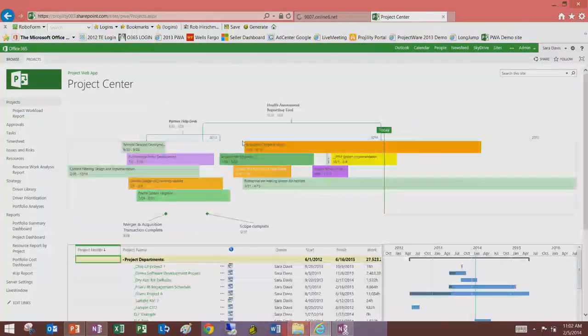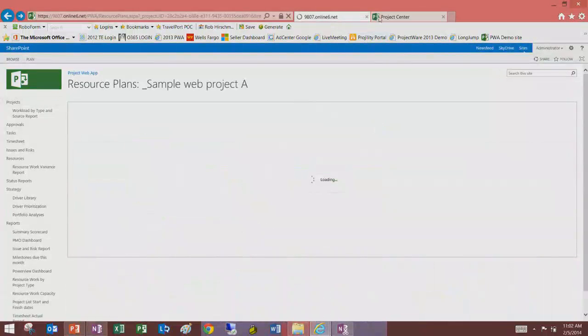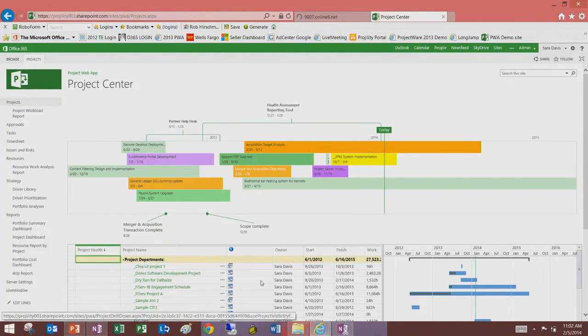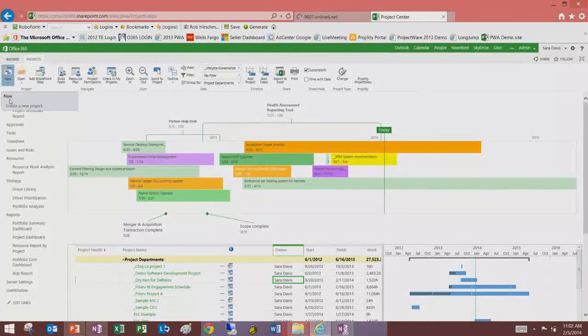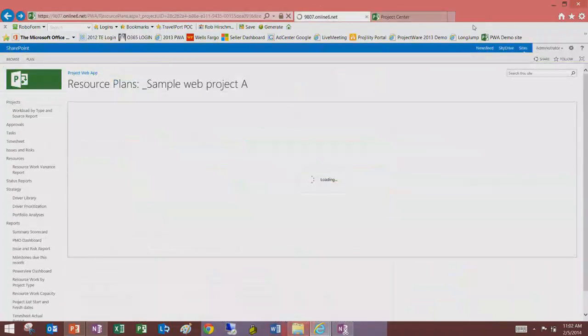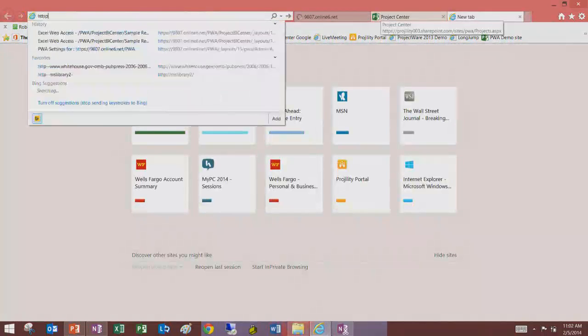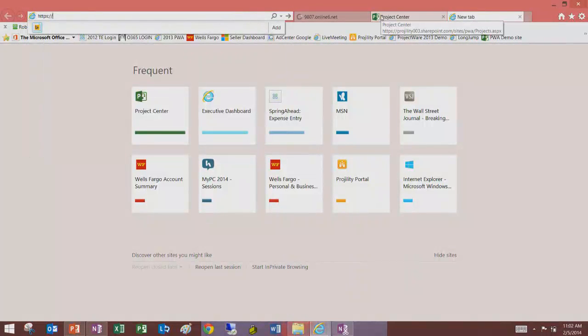The commit to the non-committed resources, meaning? There's a property in the resource pool where you can check if it's a committed or non-committed resource, and there's a difference in how it shows the availability if you want to take into account committed or non-committed resources. Yeah, that's when you're doing actual named resources. So that's kind of when you're soft booking. We're going to get to that in a second.